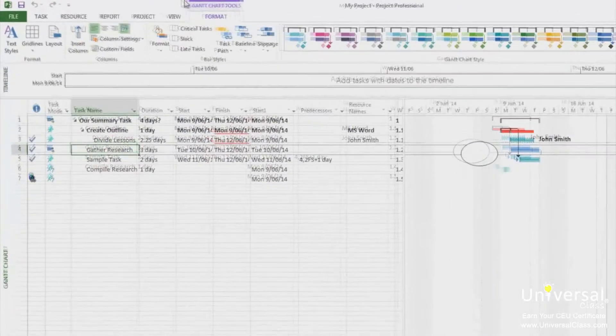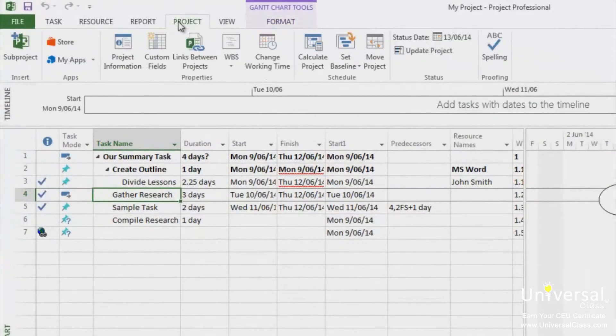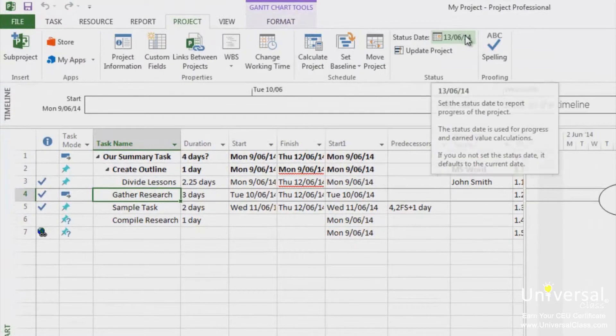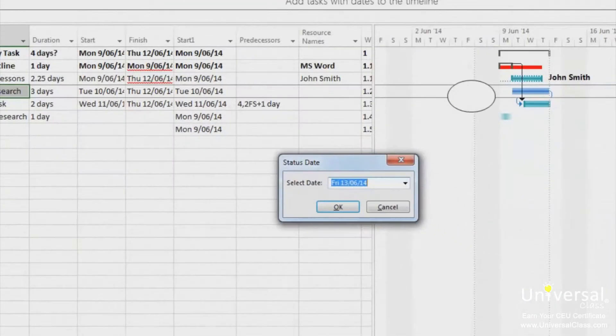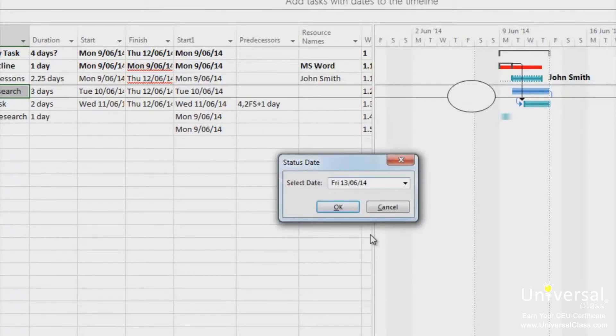To select a status date, go to the Project tab and then click on the calendar icon here. Select a status date by either typing the date in or clicking on the drop-down arrow and clicking on the date. Click OK.